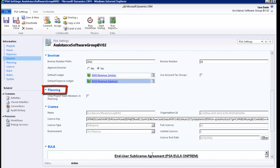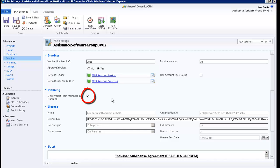Going to the next section, you will find the option Only Project Team Members in Planning. If this box is checked and you plan time on a project via an appointment for a specific employee and hour type, you will only be able to select an individual that is a team member of that project. If you leave this box unchecked, you will be able to select any employee of your organization. This will always be based, however, on the security rights and profile of the employee.